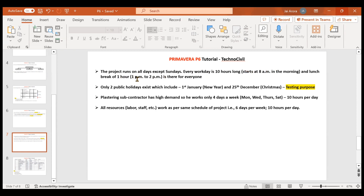The work day starts at 8 AM with a one-hour lunch break from 1 PM to 2 PM. Two public holidays: 1st January and 25th December — we'll show how to add these for testing purposes. There is also a resource calendar for the plastering subcontractor who has high demand, working only four days a week: Monday, Wednesday, Thursday, and Saturday, 10 hours per day.